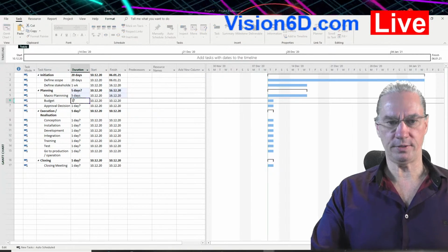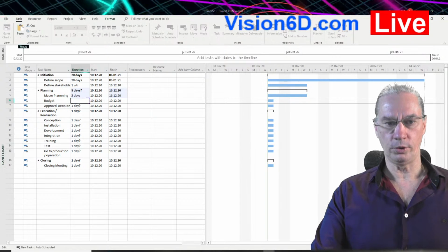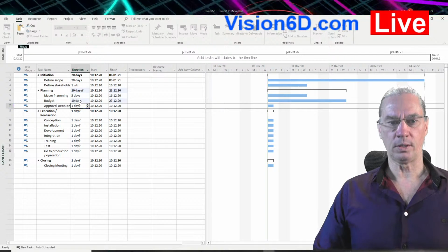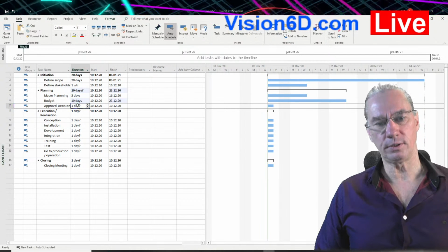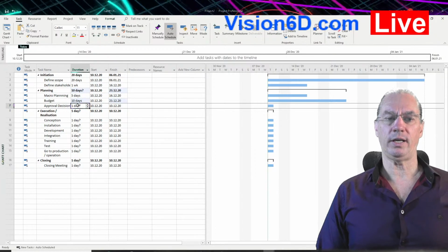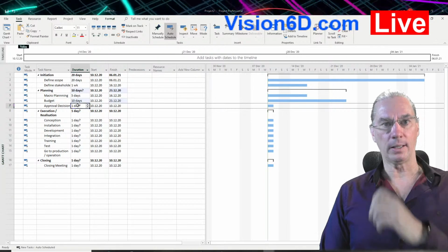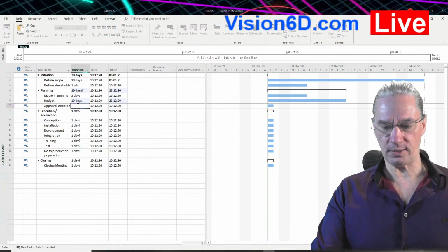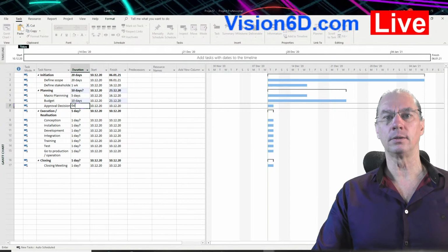The budget might take a bit longer because we need to do good estimations, so I can say 10 days. And the approval will be a bit different. The approval in the end is a decision, so it doesn't really last. So what I want to do is to say that it's a 0-day task duration.